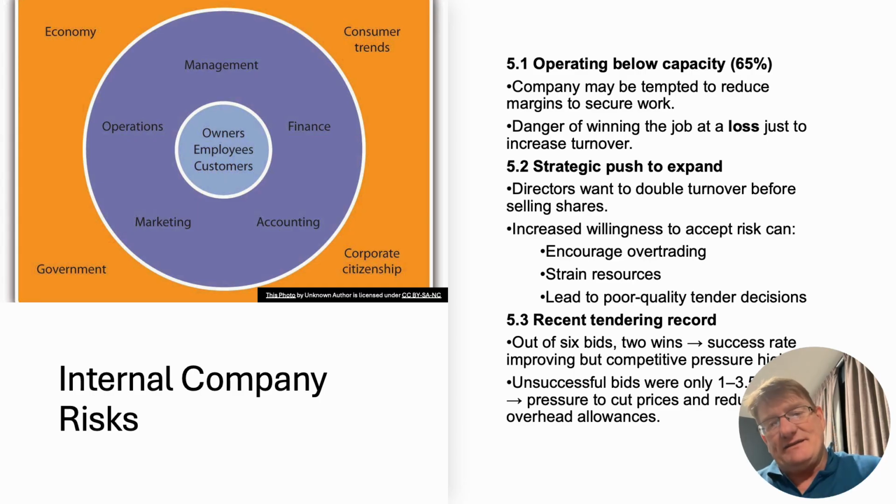So you've got to do an analysis sometimes. And they weren't, because the guy who ran the company was a carpenter, and they didn't have any quantity surveyors as such. They knew the prices, and then they would just submit this bog standard price every time, really. But when I looked at the prelims, I'd say, well, your prelims are about 30%, and I expect, because the market's so keen at the moment, people are going in maybe with 10% or 5% with their prelims. So again, look at your recent tendering record. Why are you winning? Why are you losing? Can you afford to lose?